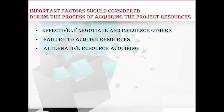The third important factor is: if team resources are not available due to constraints such as economic factors or assignment to other projects, then the project manager or project team may be required to assign alternative resources, perhaps with different competencies or cost. These are the three important factors to consider during the process of acquiring resources.